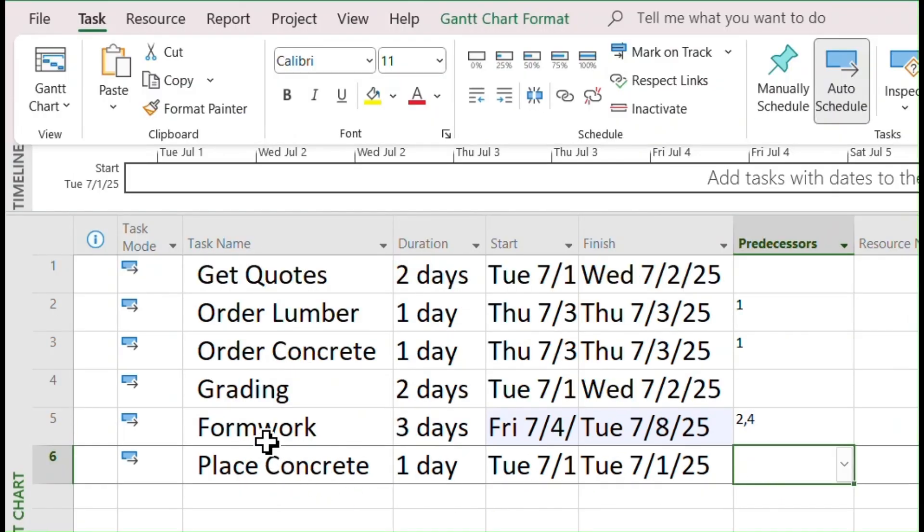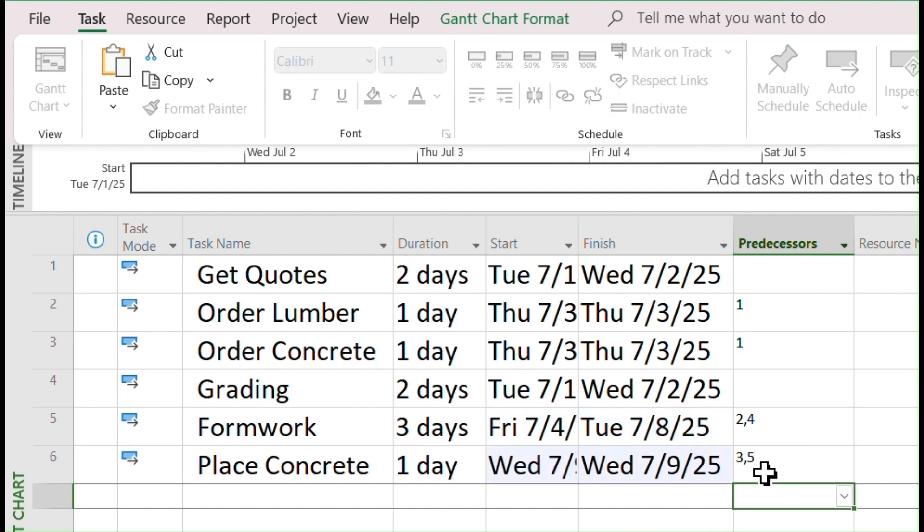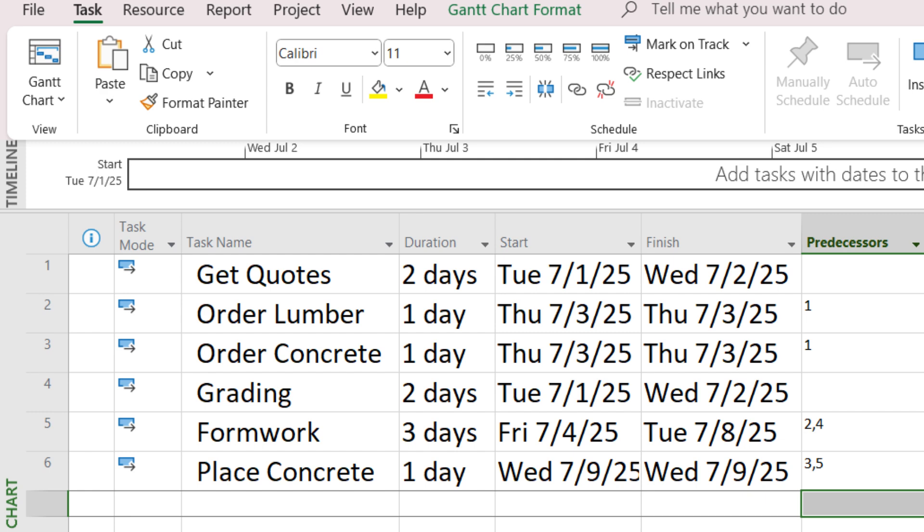For Place Concrete Task, Formwork and Order Concrete need to happen first. You can directly enter 3 and 5, two task IDs separated by a comma. By this time, you might notice how the start and finish dates for these tasks change due to the relationships among them.